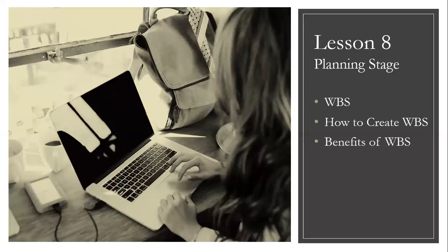You might be asking: when we already have the project scope statement, why do we need a work breakdown structure or a WBS dictionary? The point is that the project scope statement will not give you the entire detail. The work breakdown structure gives you an exact visual representation of the complete scope of the project. The project scope statement can be done by the PM himself or herself. They can talk with the stakeholders, go to the project charter, and find a couple of inputs for the project scope statement.